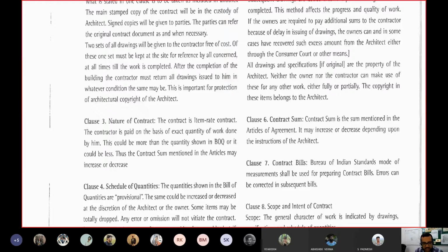If it is a price based contract, whether it is a lump sum, an item rate, a labor contract, a material contract, or a transport contract, that has to be clearly mentioned. And this can be in parity with the promise that you made during the tendering. During tendering, you have said what nature of contract you are hoping to sign. It can remain the same.